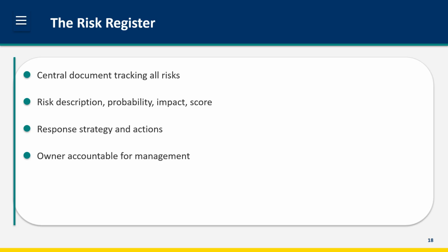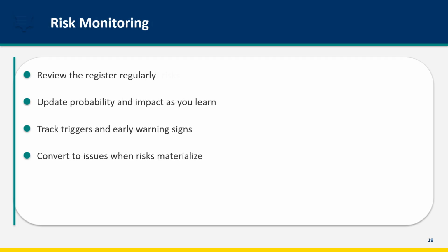The register is a living document. Review and update it regularly. Add new risks as they're identified. Close risks that no longer apply. Risk management is ongoing, not one time.